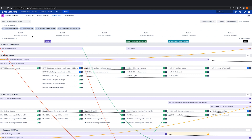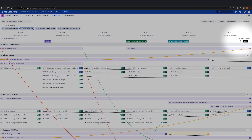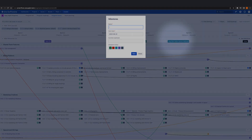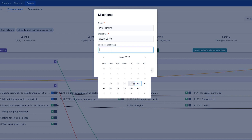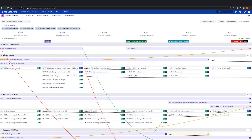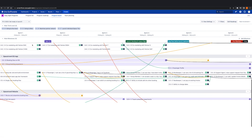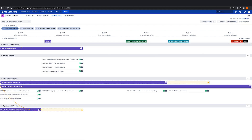While we're on the program board, during PI planning or in preparation for an upcoming increment, we'll want to indicate milestones for relevant deliverables, deadlines or external events that we're working towards as teams. To create a new milestone on the program board or program roadmap view, click the plus milestone button. Name your milestone, set a start date and an end date if you wish, then select a milestone color and hit save. Your milestones are now visible on your timeline. You can see how now we have a really visual way of having the milestones and the work of all teams represented in a single view, which helps to keep teams aligned but also to see where they may not be aligned.